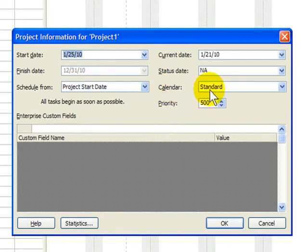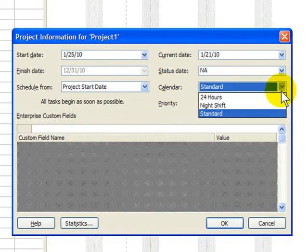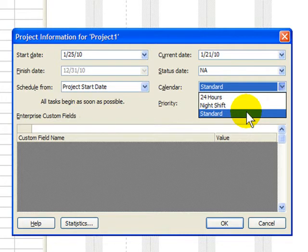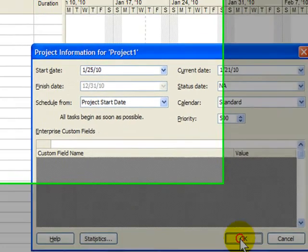Over on the right side is where I choose my calendar. And again, this is where you'd select a calendar, or if one doesn't exist that matches your needs, you go into change working time and either edit the standard calendar or build your own, something you'll be learning about later. I'm going to choose standard and click OK.